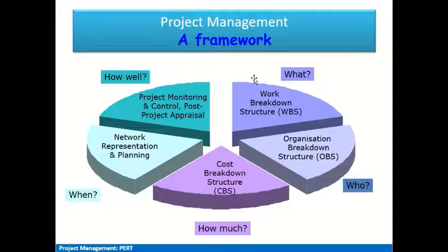So we have studied the concept of work breakdown structure, which deals with what we are going to do in the particular project. Now, who is concerned with the execution of various activities identified in a work breakdown structure, that comes under the head of organizational breakdown structure. So typically you take a look at the organizational structure and who is going to perform which function so that the project reaches successful completion. That is undertaken in that.